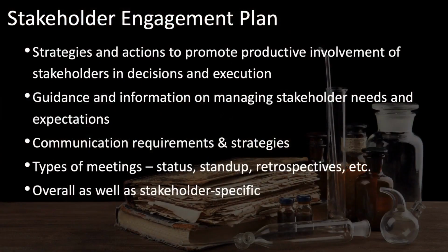And now we move on to the next major stakeholder engagement document, which is the Stakeholder Engagement Plan. This plan will include the strategies and actions that you've decided to take to promote productive involvement of stakeholders in decisions and execution of the project. It should include guidance and information on managing the stakeholder needs and their expectations, their communication requirements, and communication strategies for helping to engage stakeholders.